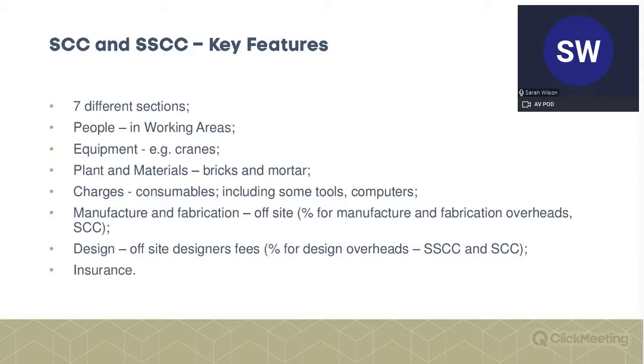And then finally, the insurance one. I think you should pretty much ignore this, because it's not to do with the cost of insurance. So it is quite misleading, which is why I said just ignore it. The cost of your insurance is dealt with in your fee percentage, so just be careful about that. This element relates to where there is an insurance claim, and how the money is paid in relation to monies paid on an insurance claim.